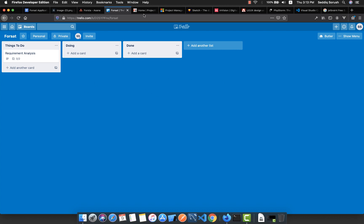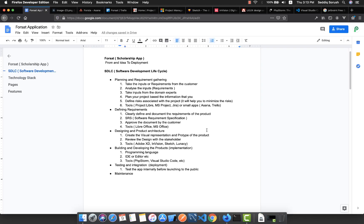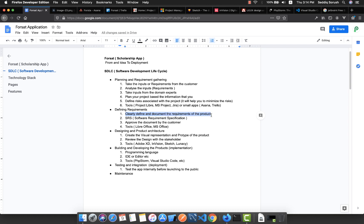The next phase we have is defining the requirements. Once we have the requirements and planned for it, we need to clearly define and document the requirements of the product. Also, analyze the SRS or Software Requirement Specification. Most of the time, this Software Requirement Specification is provided by the customer. Then once we clearly defined and read this SRS, we need to create a document and approve it by the customer.